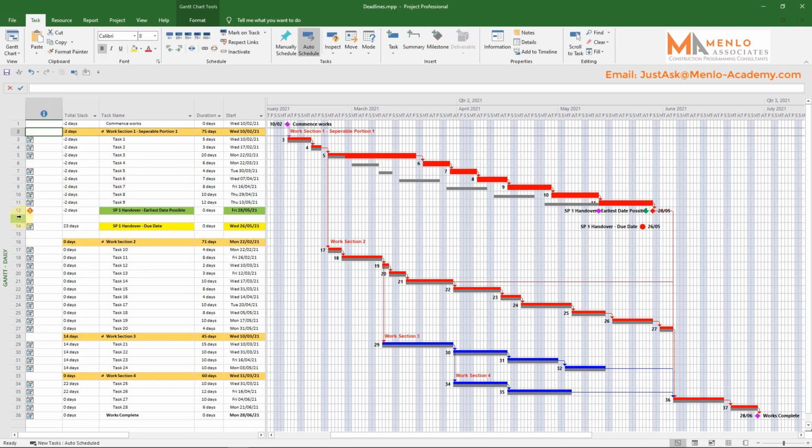With deadlines included in the program properly, it can help with keeping us up to date with the need to take corrective actions. So in summary, the deadline creates a second critical path that measures to a fixed point that we define. This lets us take steps to control what's happening both in here and in the main critical path. This is also how we use it to say where we're at, so we can see whether we're actually ahead of time for meeting a deadline or whether we're late, and it gives you these useful markers to tell you how late you are.